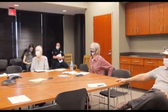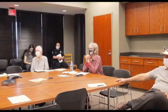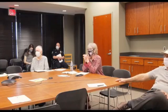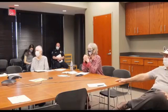If we decide that we're going to reduce it a little bit, then we have to do some more value engineering. And I don't want to say exactly what would happen with that because it's hard to know until you start crunching the numbers. My guess, off the first blush, would be we would probably reduce from a 10-field complex down to an 8. I think that would be the first biggest cut that you could do and save a pretty good chunk of money. Large chunk of money, yeah. But we would obviously try to look at where there's big cost savings and kind of work back.